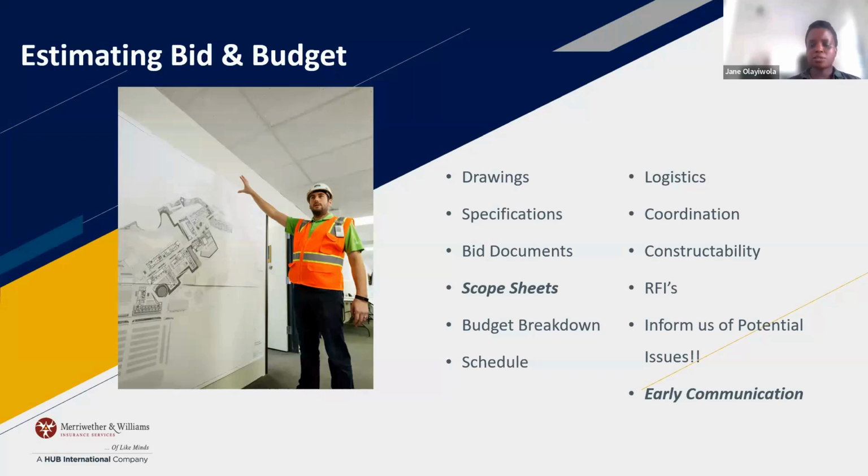So you've done the pricing and say, if you want us to hold the price till the end of the year in 2026, it's going to cost an additional 10%, 50% increase for the millwork scope or what have you, or for the framing scope. And you just have that as an alternate so that you have a rough estimate for them, but it's not calculating in your base bid.